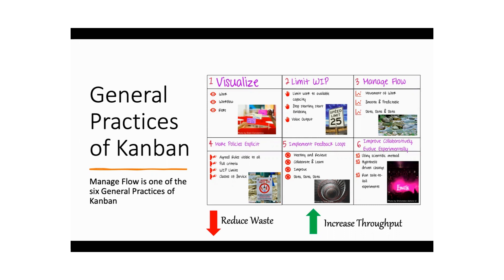The second general practice of Kanban is limiting the work in progress. When you create WIP limits in your system, it creates a pull system. The pull system helps you unburden the people who are involved in delivering that particular piece of work, as against a push system, which burdens people.